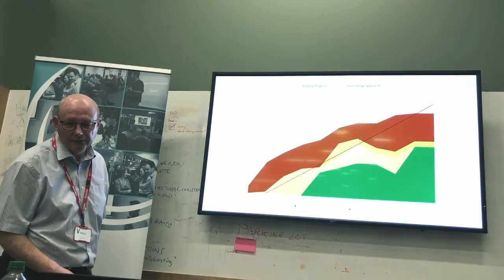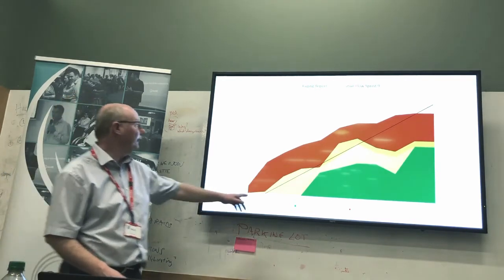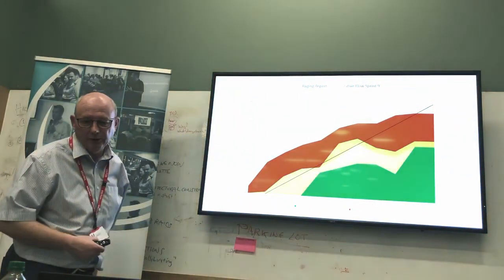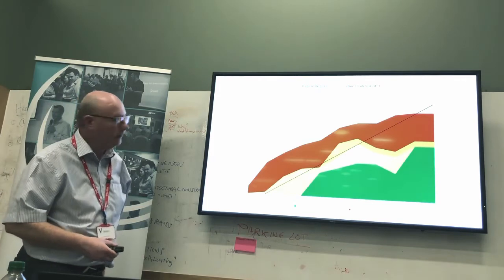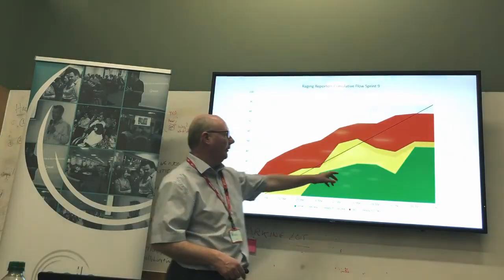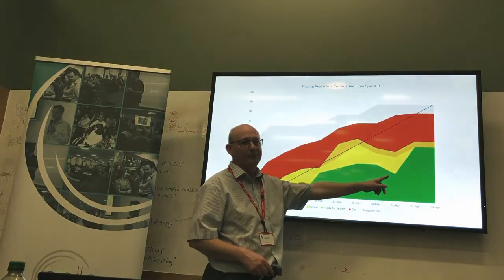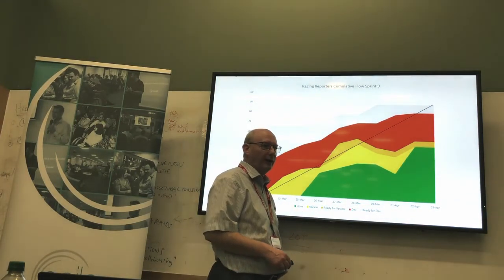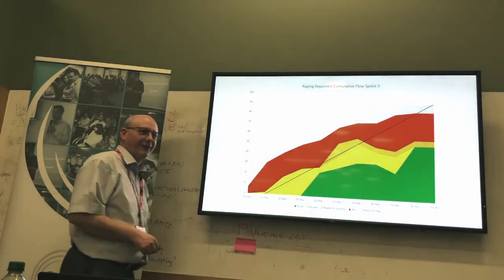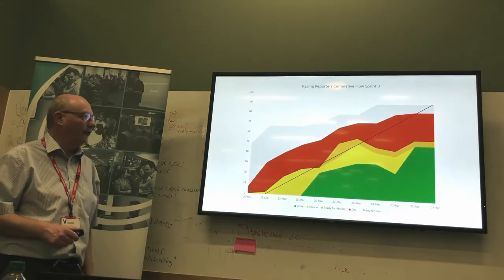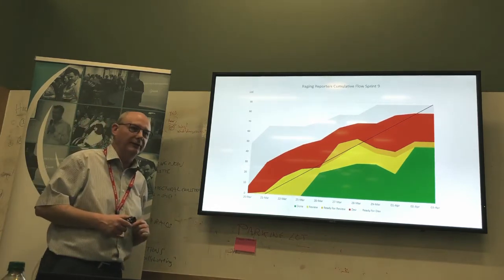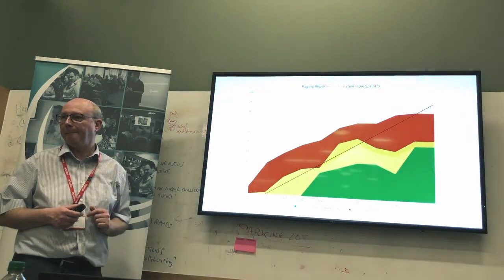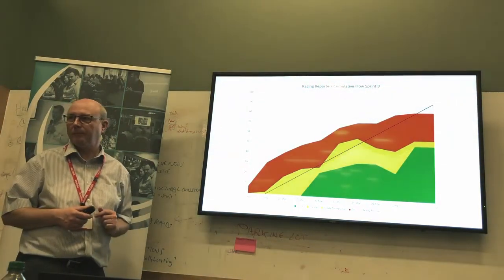Actually, I'll just tell you. Regression. You can see regression here. What we've got is UAT feedback coming in from stories that we thought we'd delivered, and people at the far end are going, oh no, that's not what I wanted. After stuff's gone to done, then they're going, I've changed my mind. Should you bring it back from done, or if they change their mind, shouldn't you introduce some way of rectifying it with a new story?